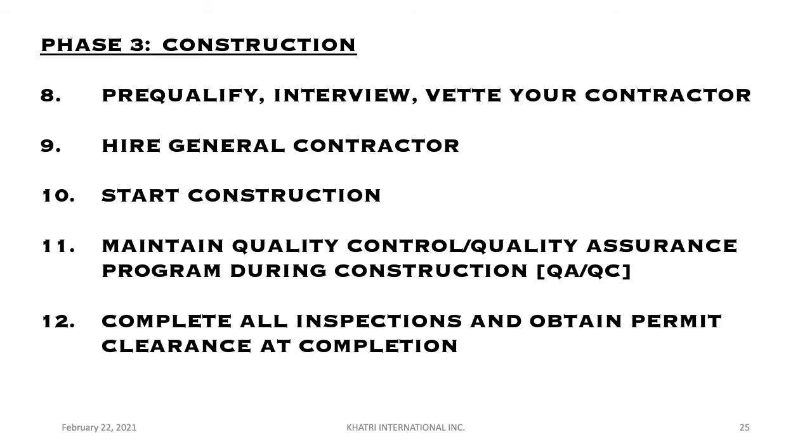So you want to make sure that they do what they said they were going to do, what they were paid to do. And to do that, you should have an inspector on your project, either the structural engineer of record who did the plans, or hire an independent inspector, but you need to have a third party involved to offer that quality control and quality assurance. Otherwise, again, you'll be back to where you were before you started, which is having issues, and nobody wants to be there.